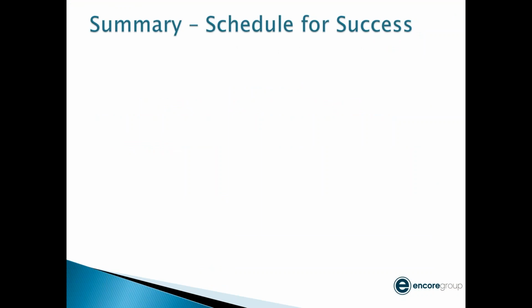your risk associated with your project by the percentage of activities that are critical, by tracking the critical path activities that are slipping, and utilizing your milestone report, that little spreadsheet. You can do it off of that, and then just fill in your key diagnostic things in a schedule. You can get some really good trends, and it's simple to do. You can have an assistant do it, and be able to tell when projects are in trouble, right? That schedule validator is a great tool for doing that. I actually use it for dashboard functions as well.